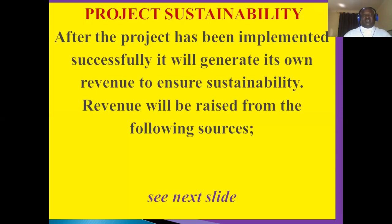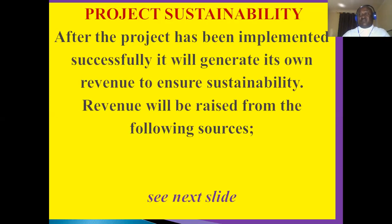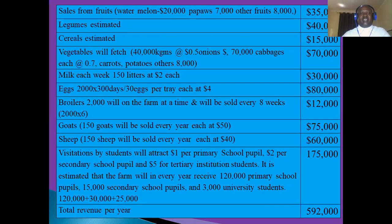Very important is project sustainability. After the project has been successfully implemented, it will generate its own revenue to ensure sustainability. Revenue will be raised from the sources shown. Sustainability here means that at one time the initial funding will be exhausted into the project — so how will the project continue without the funder's hand? There should be continued generation of revenue and operations. Go through this, my students, and see how revenue will be generated, compare it against the expenditure, and assess the sustainability of the project.